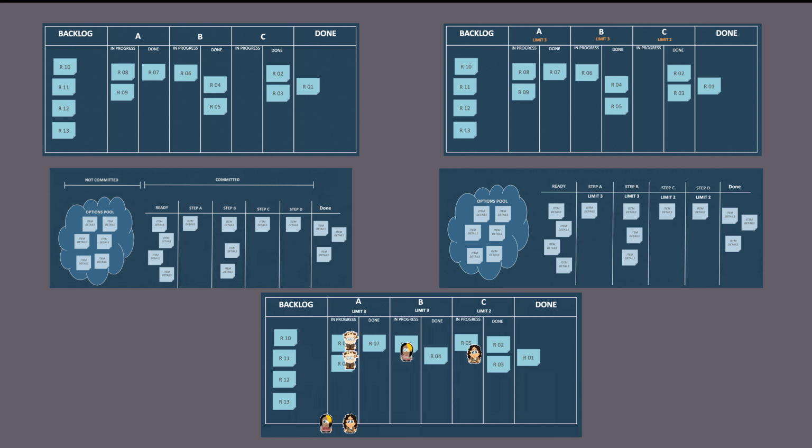There isn't a predetermined formula that will tell you how to set up optimal work in progress limits. You need to see what works for you and for your team if you're working with one. There is one rule to keep in mind though. WIP limits should not be exceeded at any cost unless there is an urgent task that needs to be considered the highest priority, and that should definitely be an exception.